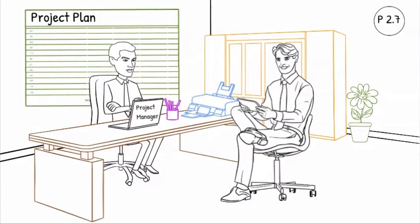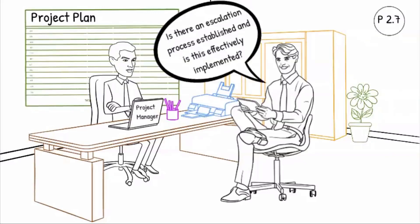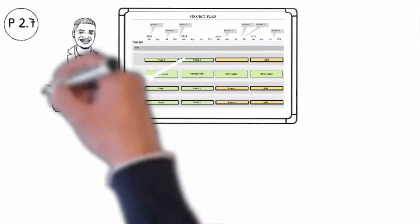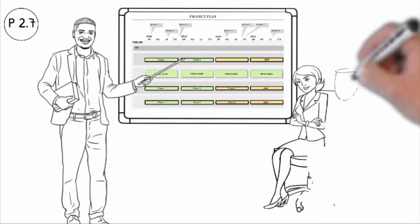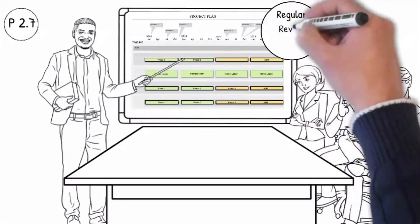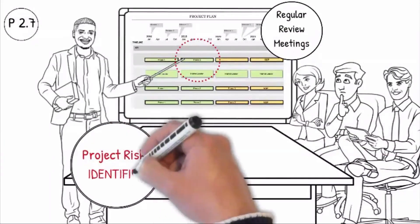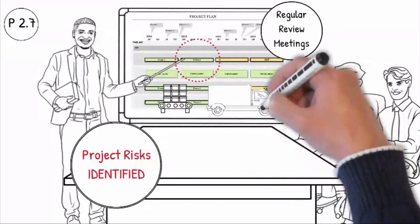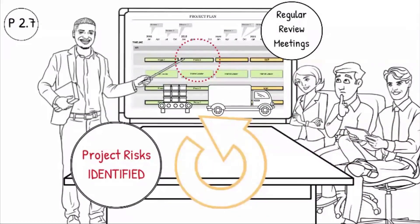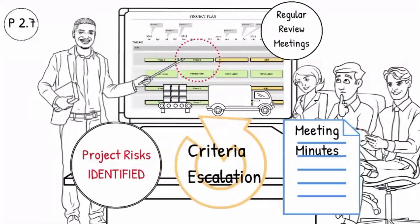Question P2.7: Is there an escalation process established and is this effectively implemented? Regular project review meetings are scheduled to review the project milestones and the budget. During the project review meetings, each team member must present the status of their work breakdown activities and highlight all risks related to technology or supplier which might impact the overall success of the project. The criteria for escalation are defined, responsibilities and authorities are regulated, and measures are established when deviations occur. Milestone review meeting minutes including escalation measures are communicated to all stakeholders to ensure they are informed.